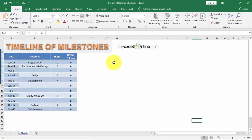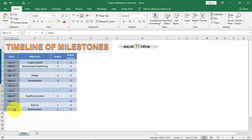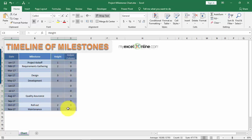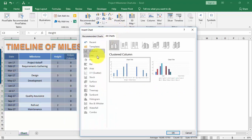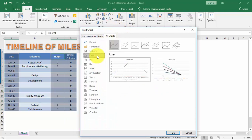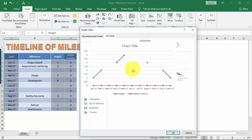Let's create this from scratch. First, highlight specific columns — the Date, Height, and Helper columns. I'm holding the Control key to select these three columns separately. Then go to Insert and Recommended Charts, and select the line chart — specifically Line with Markers — that's what we need.